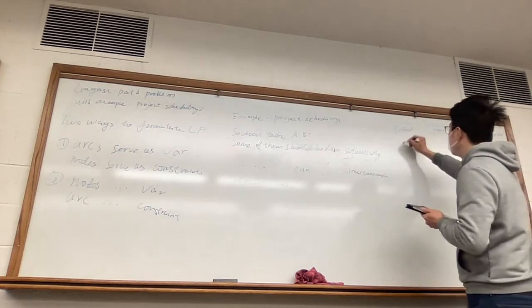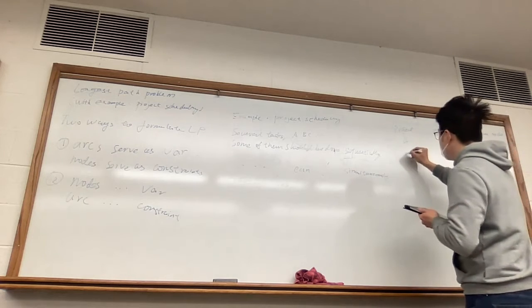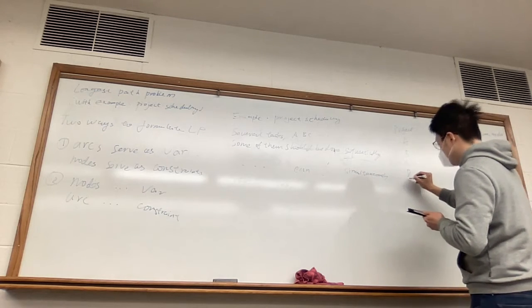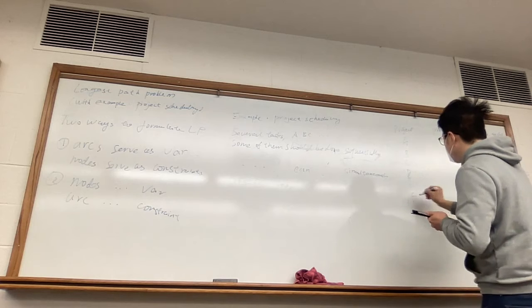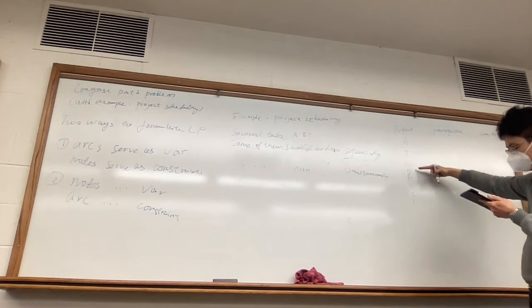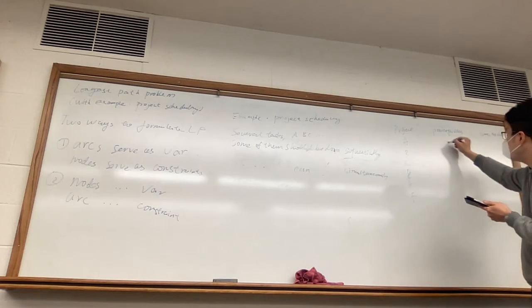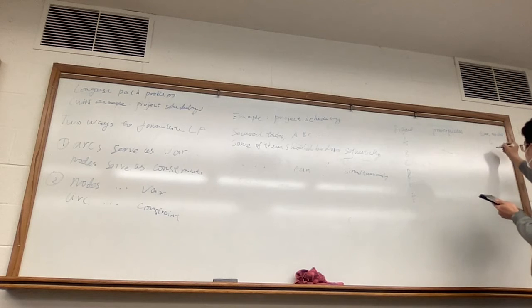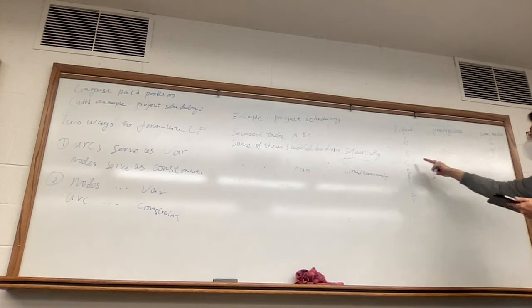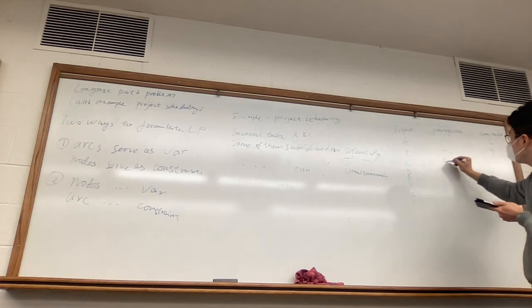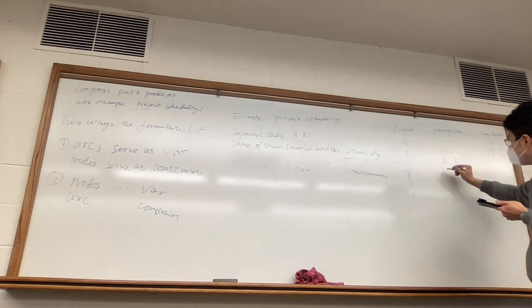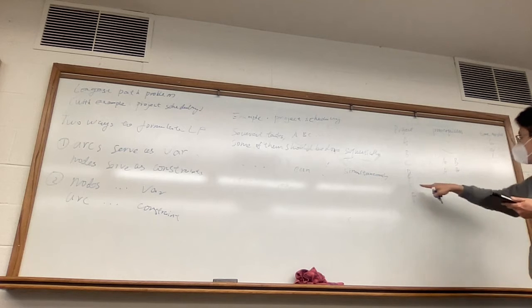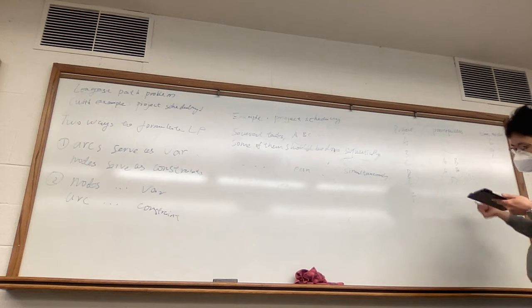Okay. So suppose we have A, B, C, D, E, and F. These are our projects, or say our courses. A and B do not have prerequisites, and you need 6 hours and 9 hours to complete A and B. For project C, you need prerequisites A and B. For project D, you also need prerequisites A and B. For E, you need D as a prerequisite.